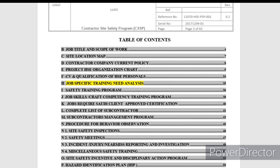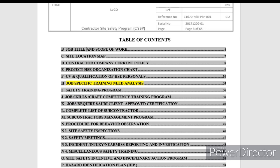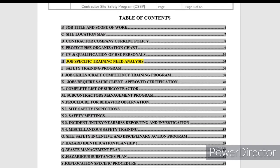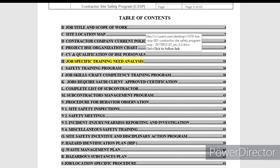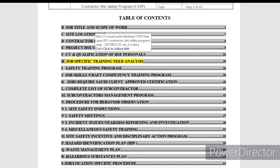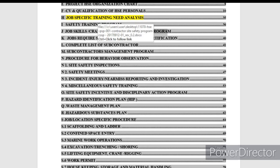I am going to cover the basic requirements of the construction safety manual that I have made. This is the format for the project. If you want, you can create specific content and change the numbering — one, two, three, four or A, B, C, D. The first sections include: site title and scope of work, site location, contractor company policy, HSE organization, CVs and qualifications, job-specific training requirements, and safety training programs.